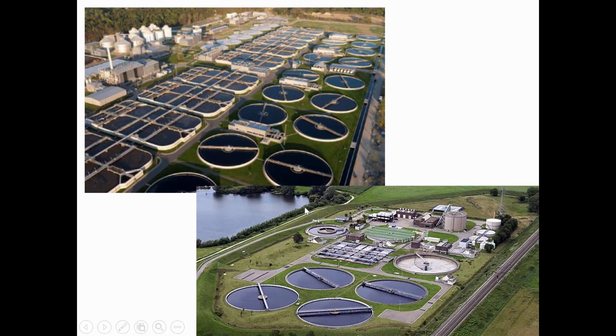This is a lot smaller, and sometimes there are cost differences that are related to economies of scale. We've already talked about how cost index data can be used to account for the change in prices over time, and also the change in prices from place to place. But you can also take an approach that allows you to correct for differences in size.